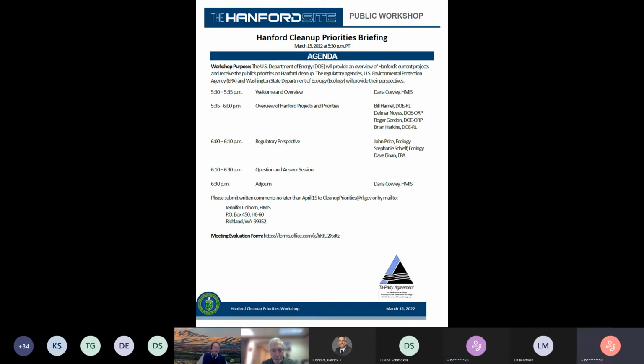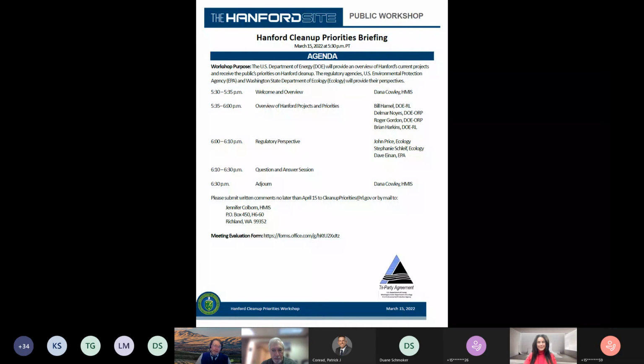Yeah, and if I can add. Go ahead. I agree with what Delmar said. I'll just add a little more detail. So the milestones you want to look at are the M-62-60, -61, and -62 milestones. The -60 milestone has DOE turning in a report to Ecology in 2026 about their disposition pathway for those capsules. The milestone itself identifies vitrification of those materials in the waste treatment plant as the baseline scenario.